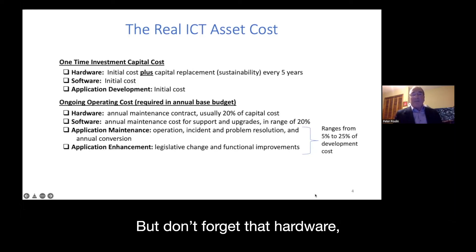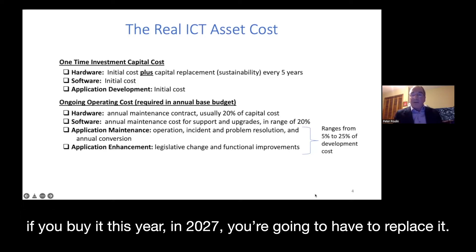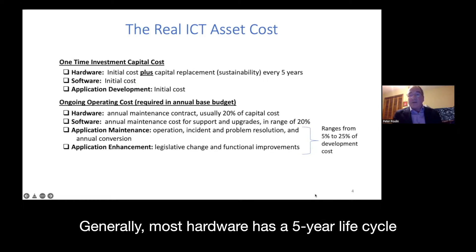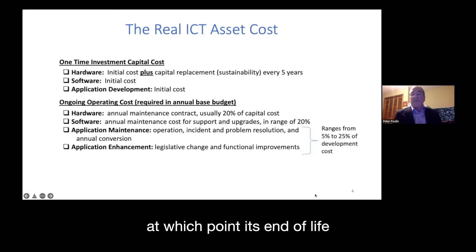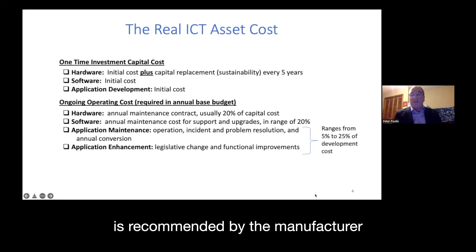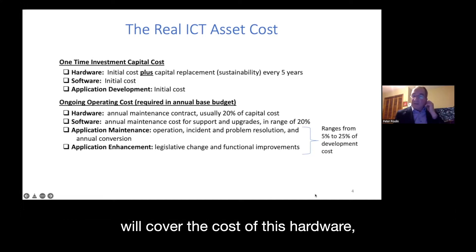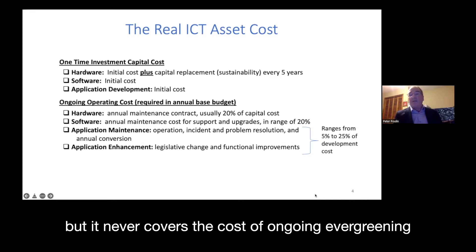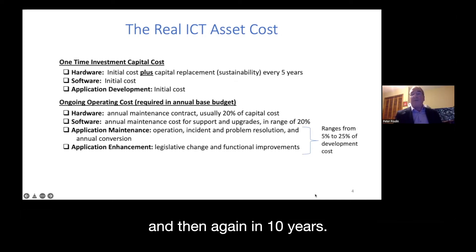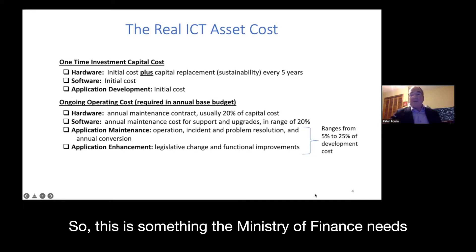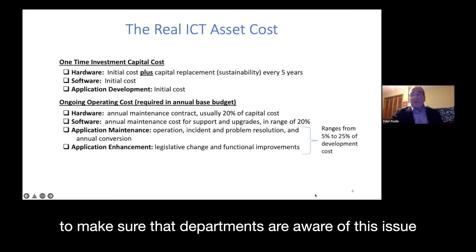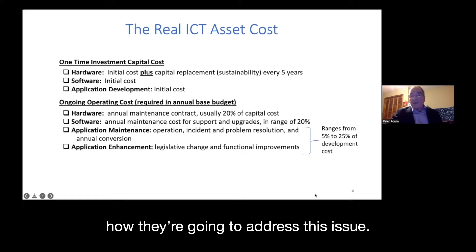Don't forget that hardware purchased today will need to be replaced. Most hardware has a five-year life cycle, at which point it's at end of life as recommended by the manufacturer and needs to be replaced. A Ministry of Finance submission will cover the cost of the initial hardware, but it never covers the cost of ongoing evergreening — replacing it in five years, then again in ten. Ministries of Finance need to make sure departments are aware of this issue and have plans to address it.